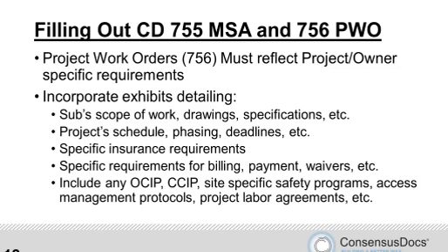I'll just call your attention, if Brian, you could just advance to the 756 slide, you'll see that this is a simple 2-page document. It is exhibit driven in that you will use the actual project documents or a template or a format that you can create on your own to meet your own needs in order to define what the subcontract work is, what the drawings, specifications, and project conditions are. These are all things that already exist or that are known to your project team, or that should be known to your project team.